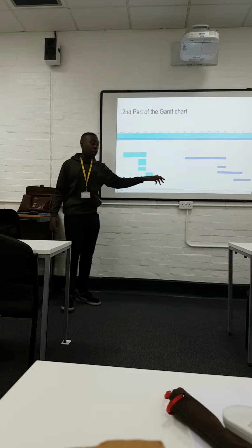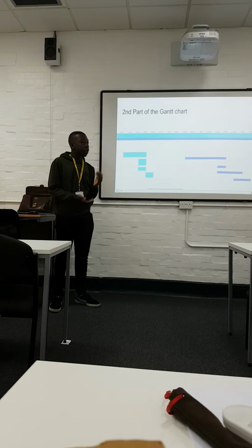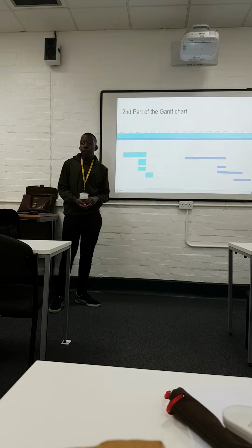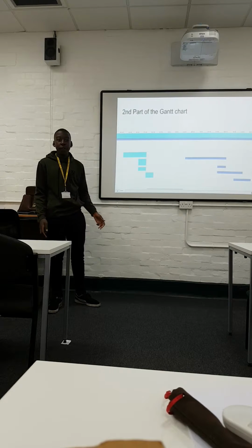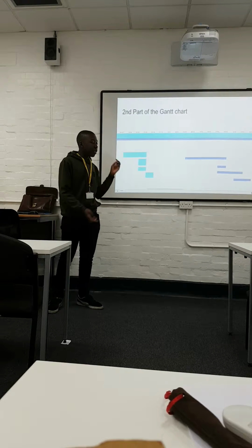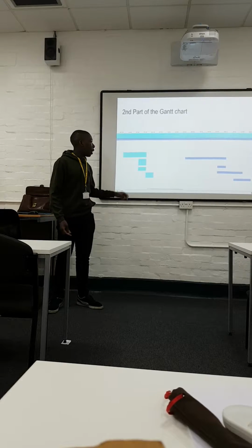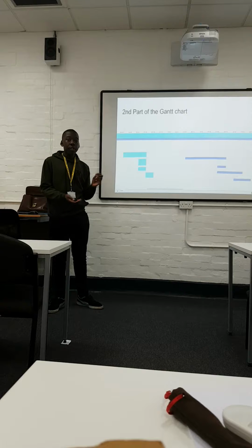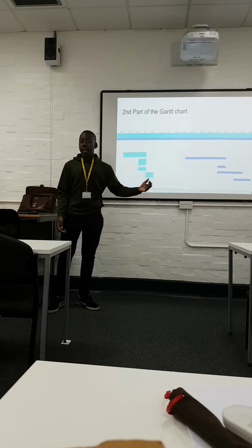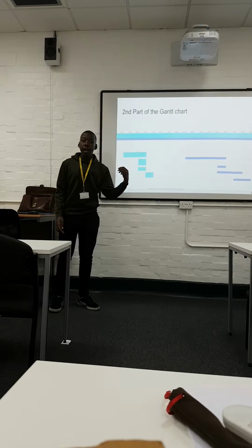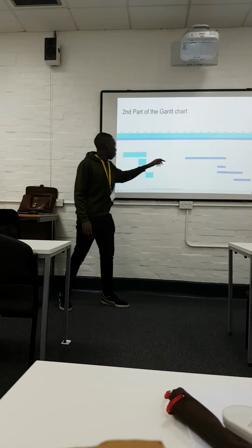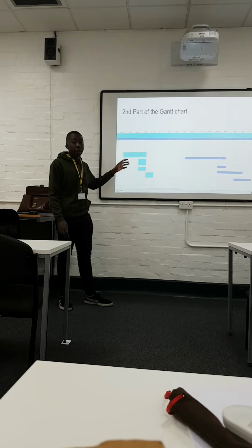That's because it took me longer to buy the parts than expected, generally because of the cost, as I thought it would cost less than what I actually paid. Actually sourcing the parts also took longer, and when I did buy them, there was a delay because they had to be shipped here. So I spent a month on it, when I actually planned to spend only about 3 weeks.